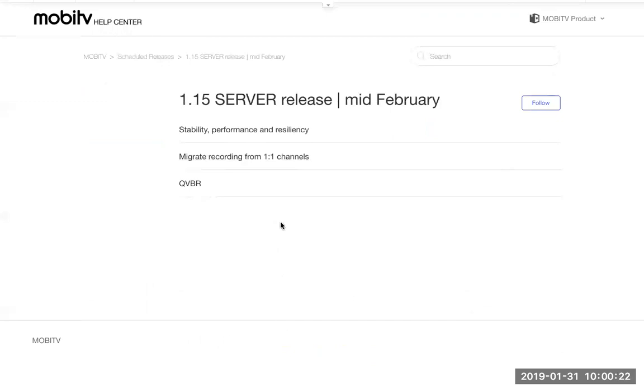Also, just a refresher from what you will have likely already heard during your kickoff meeting is that the MobiTV approach is to ship every 6 weeks. That is our approach. That is the agile way, to ship on time regardless of what is ready to ship, right? So what we do is we go through an exercise where we schedule what we think we can ship based off of our velocity and how big we expect the feature to be. Sometimes we get that wrong. In some cases we'll have overestimated the effort and realize that we're able to support it much more quickly than we thought. We also have it happen the other way where we underestimated it. It's turned out to be more complicated than we thought and we don't end up shipping it during the time frame that it was scheduled to ship in.